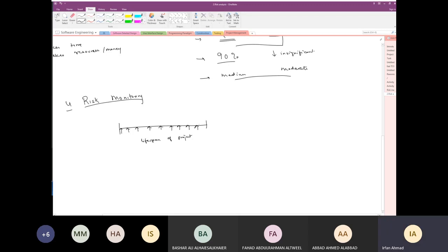And what it will mean is that maybe some of the risks were high initially in the project, but after a few weeks, those risks became moderate or low. So you have to continuously analyze your risk and update your plan. For example, in terms of risk identification and analysis, with risk monitoring throughout the project, new risks might be added to the project.